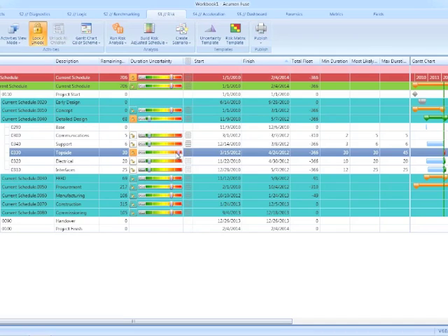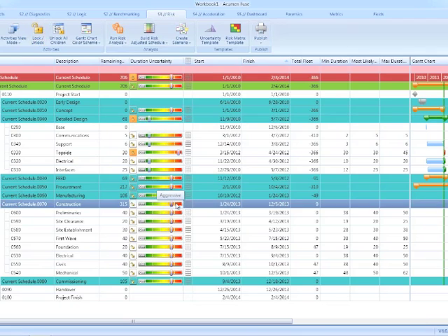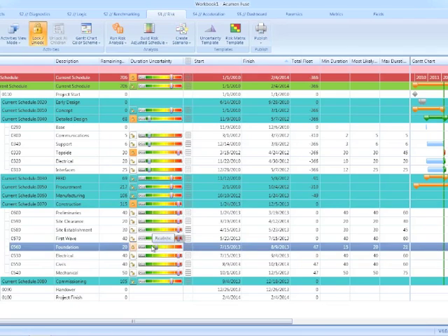In addition, if the team change their mind later on or want to reassess the uncertainty around detailed design, they can still go ahead and change the grouping as a whole, but because topsides was flagged as an exception, topsides remains as an exception to the rule. So hopefully from this example, you can see that it's an extremely fast means of going through the different WBS categories, assigning those uncertainty factors. If you choose, individual activities can even be manually overridden with more of a traditional 3-point estimate approach. The groupings don't have to be WBS. It can be based on, for example, a code structure.